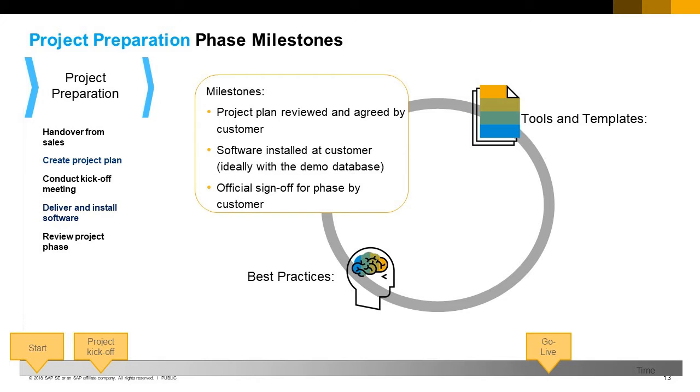Note: the customer project manager and other key team members should have been appointed during the sales cycle. The sales team has responsibility to ensure that the customer has staffed the project team and that the project is supported by the company owner or sponsor.